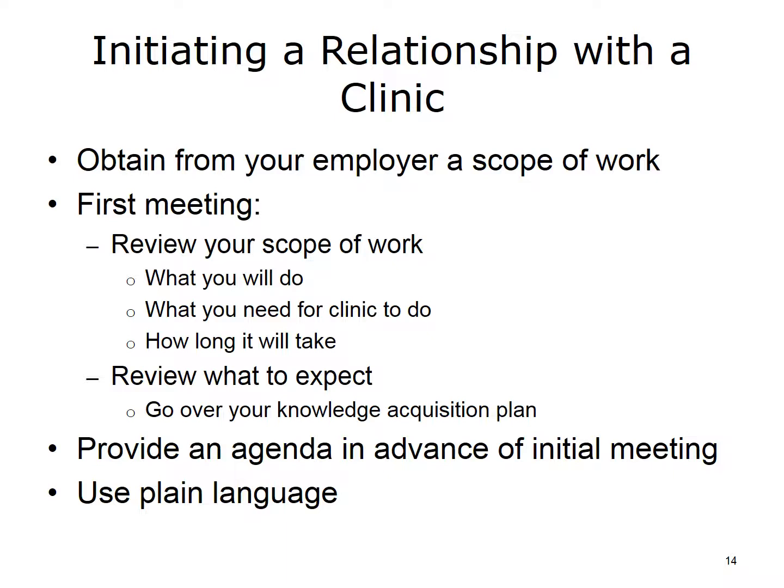At the first meeting, review your scope of work with the primary clinic representative. Decide what you will do, what you need the clinic to do, i.e., set aside time for meetings, interruptions, or a half Saturday for process walkthroughs, and how long your work, the project, meetings, interruptions will take. Also, review what the clinic should expect with respect to its time commitment and what your deliverables are. Be sure to go over your knowledge acquisition plan.